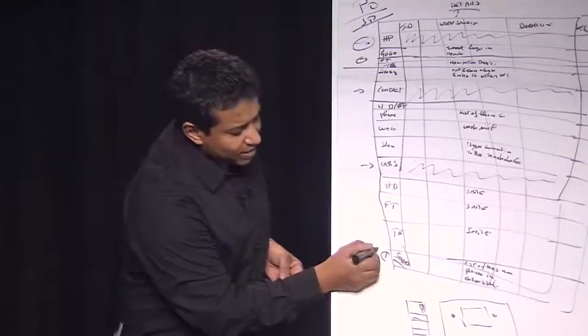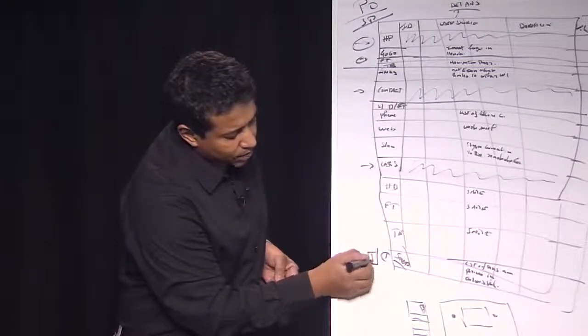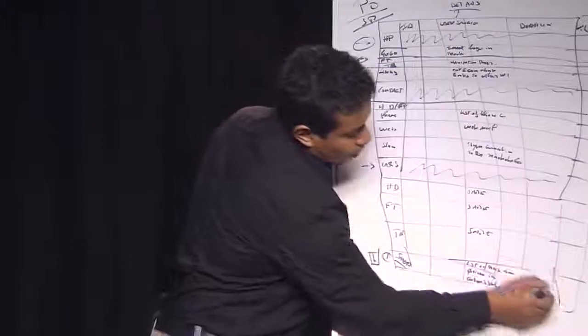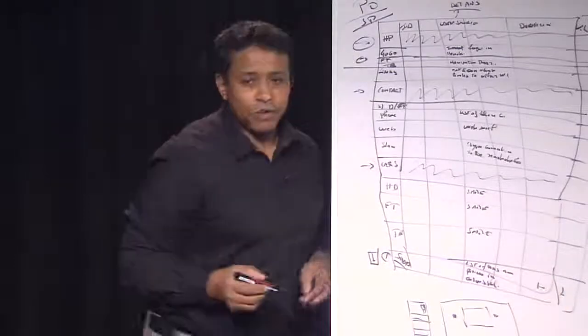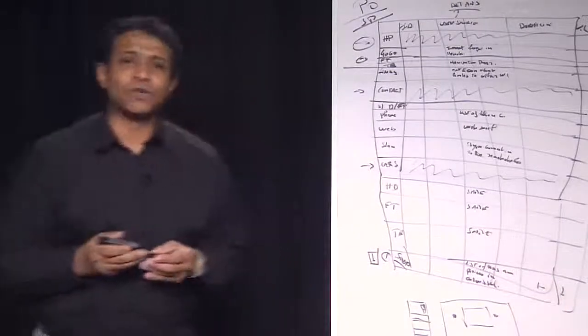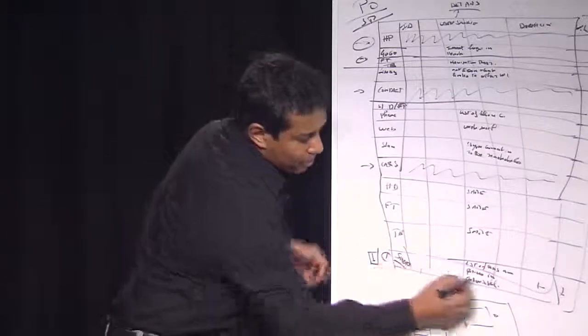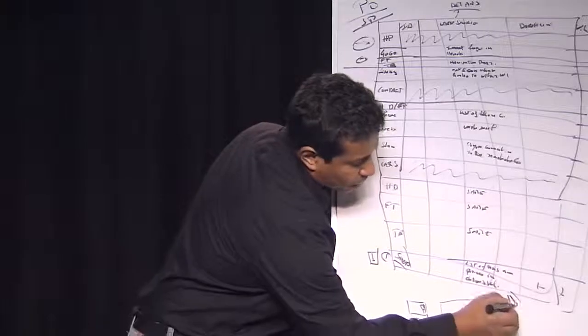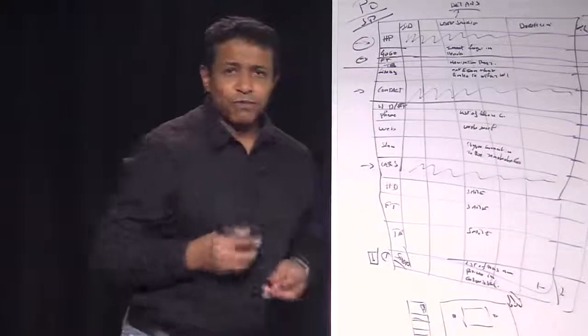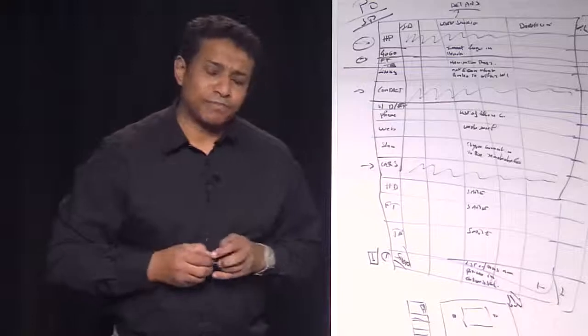So this is not possible to make duration and velocity here, because this is not precise enough as a user story. To me, as a Scrum Master, here we've got to get more details to get more functionality. This is one of the roles of the Scrum Master.